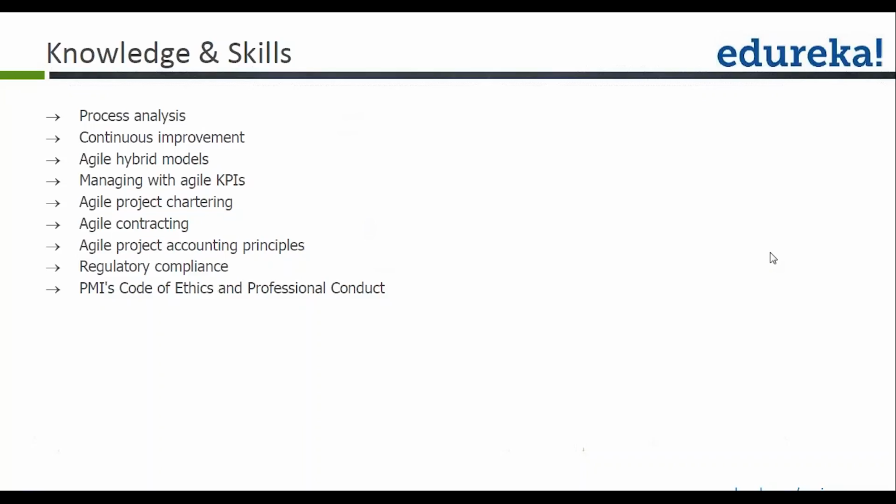The expected outcome of the pilot. Okay, so if I'm doing an agile project in a fixed bid mode, the expected outcome is coming out with kind of a predictability, how much work I can actually do per unit of time. Based on that, I will be in a better position to estimate. And then only as a provider of the service to the client, I'll tell them that within this time frame, within this budget, this is what I can do. That's the expected outcome of a pilot.